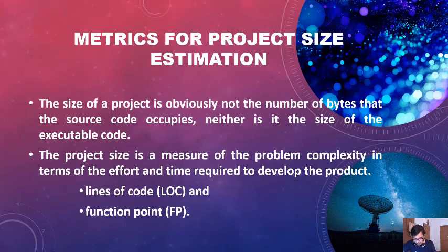The software cost does not mean the cost of the employees only. It includes heating and lighting the office space or cooling the office space, and the cost of supporting staff such as accountants, administrators, system managers, cleaners, and technicians.